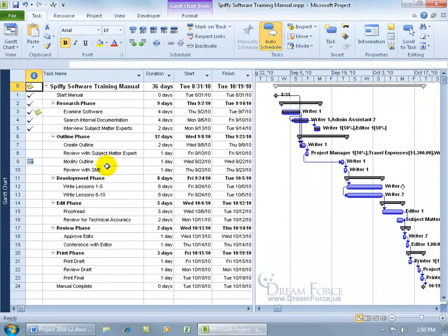Setting an interim plan will take a snapshot or a copy of your start and finish dates of all the tasks that you have in your project after your project has begun, and up to 10 interim plans can be saved and set as stages throughout your project's timeline to go back and compare against your baseline with.